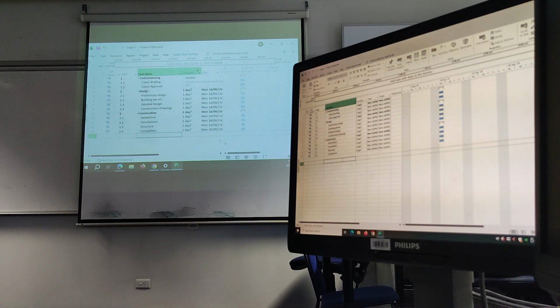Okay, so everyone update. What we're going to do now is put the durations in. The thing to note here is that those durations are provided in weeks. So there's 5 days per week. While task number 1.1 is 1 week, that's 5 days. You can either put in 5 days, or you can put in 1 week, and it's going to do the same thing.